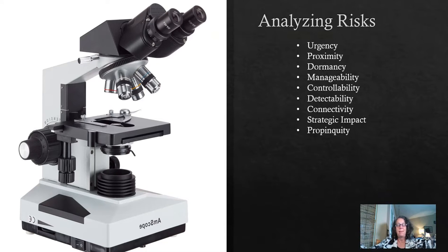There could be layers of projects: projects within the organization, then projects between that organization and another organization, then projects in outside organizations. If they have interdependencies, the proximity could matter: if a project that's 3 layers out has a problem and gets delayed, that's going to have a different impact on our project than if it's a project within our organization.